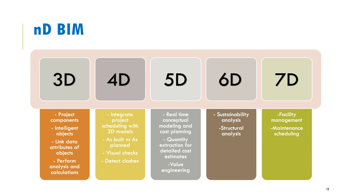BIM covers several dimensions. In 3D BIM, you have a model that includes all objects and components of your project, linked to data attributes such as costs and material types, enabling structural and sustainability analysis. In 4D BIM, the 3D model is linked to a construction schedule, adding the time aspect, which allows you to simulate construction progression.